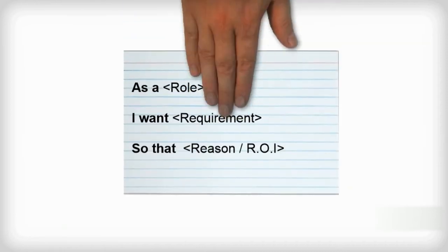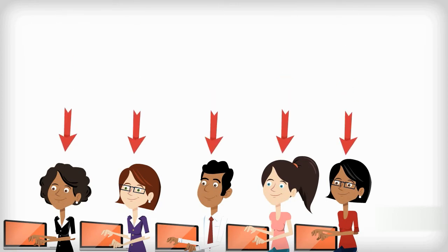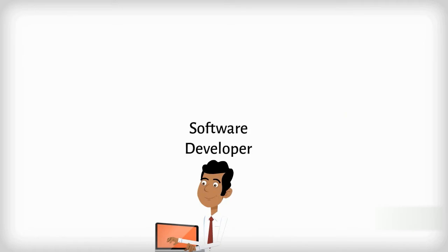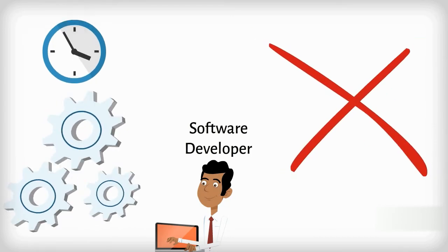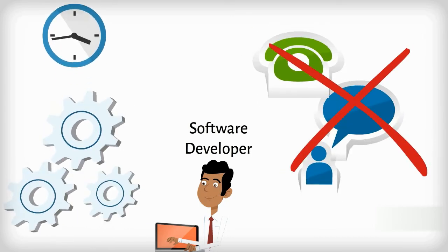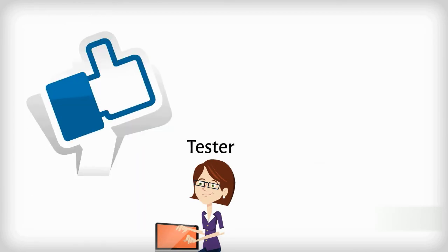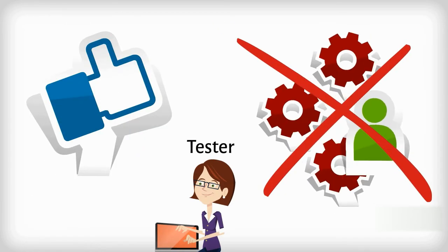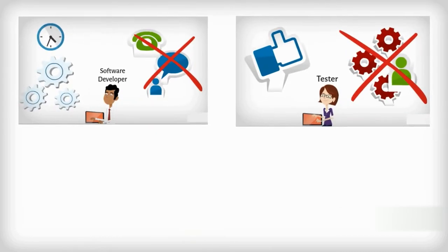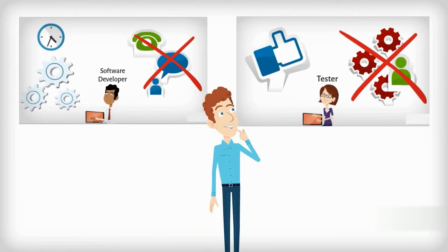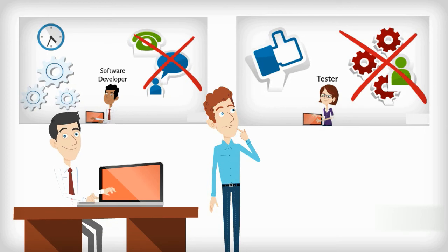The best way to know if a story is ready for planning is to be aware of what the team's roles are and do everything possible to keep them focused on their role. That is, a software developer should be spending as much time as possible developing software as opposed to contacting third parties for specifications. A tester should be checking for quality instead of waiting for third-party software to come in. These are examples of impediments for the Scrum Master. A product owner will need to do as much research as possible to prevent these situations arising from the Scrum Master.